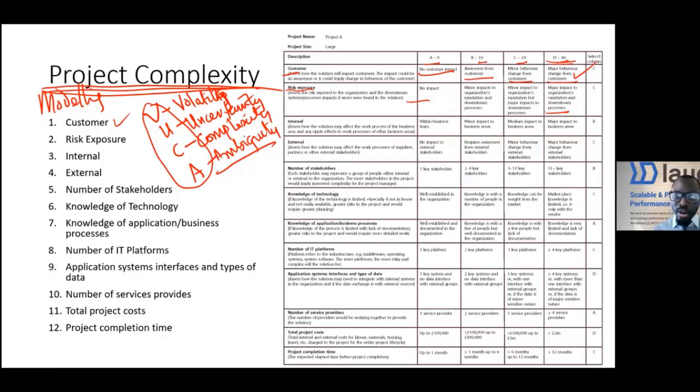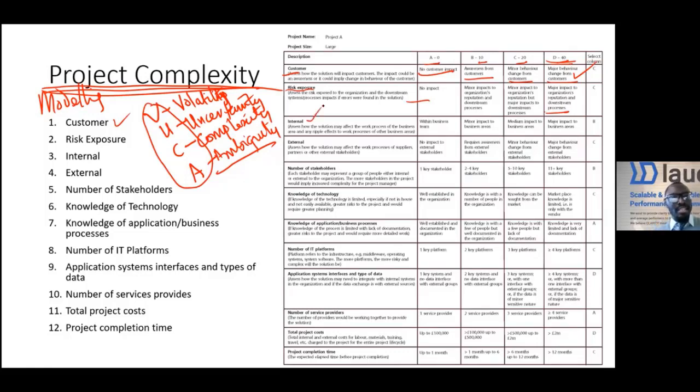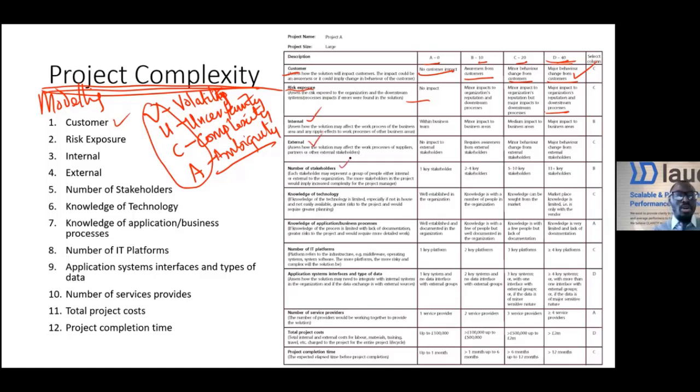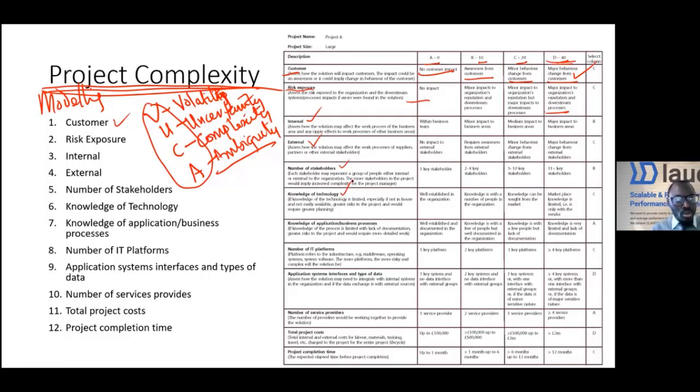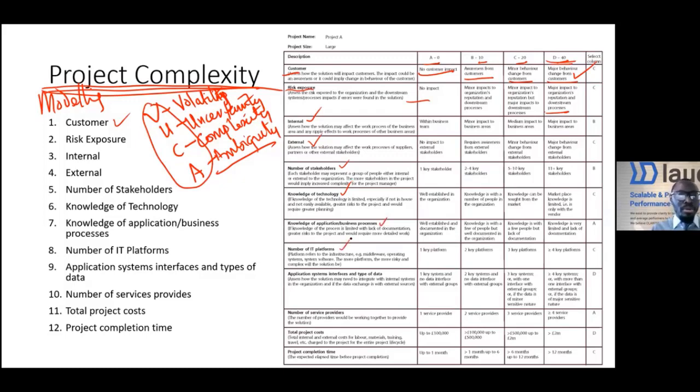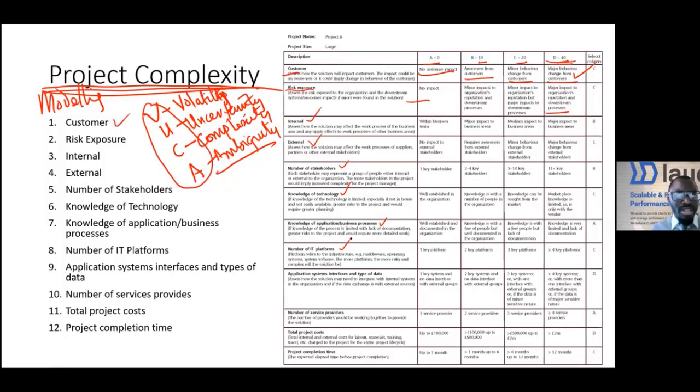Next we're looking at the impact on internal teams, the impact on external partners as well, how many stakeholders will be affected, and the knowledge of the technology. Do we even know about that technology? The knowledge about the application of processes and the number of IT platforms that will be involved or affected.